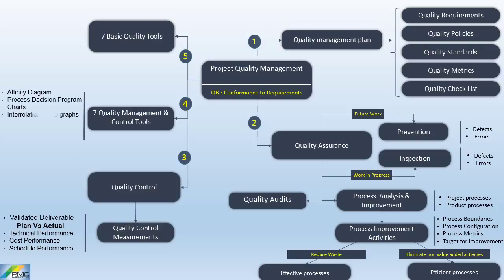The fourth key concept is the seven quality management and control tools, primarily used in quality assurance to improve processes. Affinity diagram is a group creativity technique that allows a large number of ideas to be classified into groups for review and analysis. Process decision program charts is used to understand the goal in relation to the steps for getting to the goal. Interrelationship digraphs provides a process for creative problem solving in moderately complex scenarios. The tree diagram shows a decomposition hierarchy to visualize parent-to-child relationships.